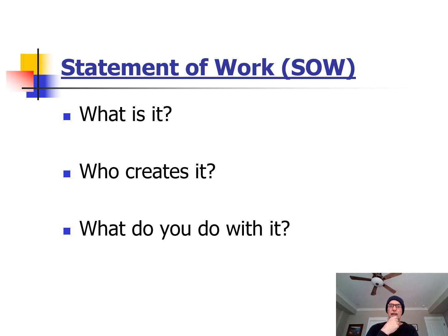So I highly recommend that you have the customer develop it. Now, as a project manager, you can help the customer develop it, but ultimately it needs to come from the customer in, let's say, a letter or a memo where they sign off. So it's a formal document that comes from them.